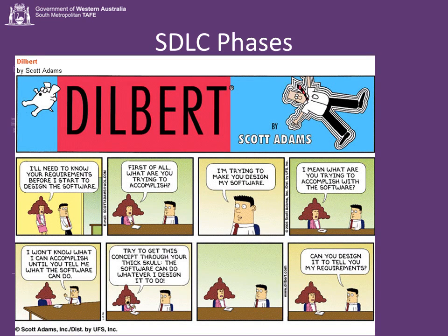Phase 2 is the design phase. The system and software design is prepared from the requirement specifications. The system design specifications serve as input for the next phase of the model. In this phase, the testers come up with a test strategy, where they mention what to test, how to test, and when to test.